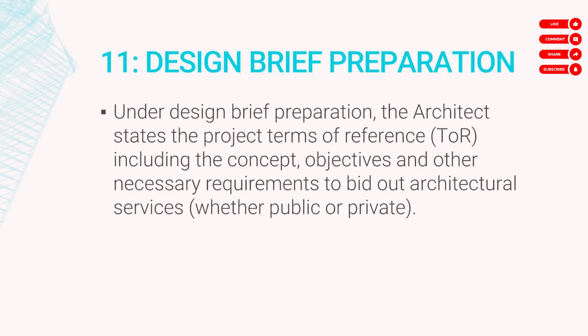Hey, kwento pala sa kanya, papadesign kasi kami ng airport, ganito karaming terminals, blah, blah, blah. No, normally there's a document that you give to them that they will read in order to understand exactly what they're dealing with, in order to understand exactly what they're going to be designing. Okay? And after they have read that document, they should be ready now to think about it and figure out how much yung tamang isingil for a project like that. That document is called the Terms of Reference or the Design Brief.